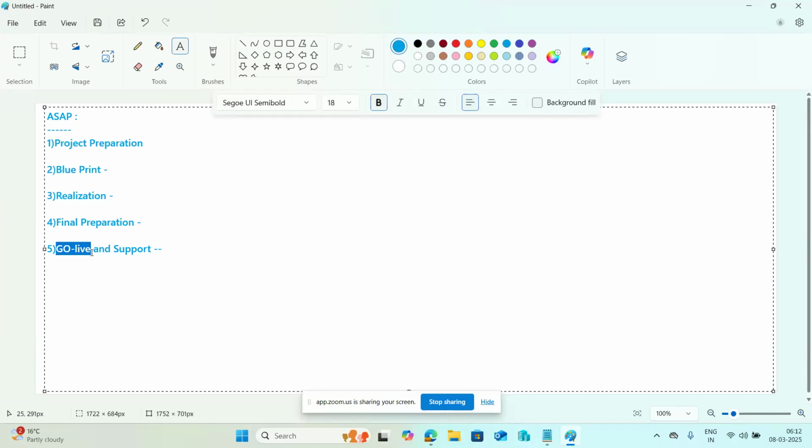So here the business owns and executes the new business process, monitors the business results, monitors the production environment, and establishes the center of excellence for the support and enhancements. This kind of activity in the live production environment will be done at our operational help desk, and go live, post go live, end user training, updating the business cases, and close the project here.